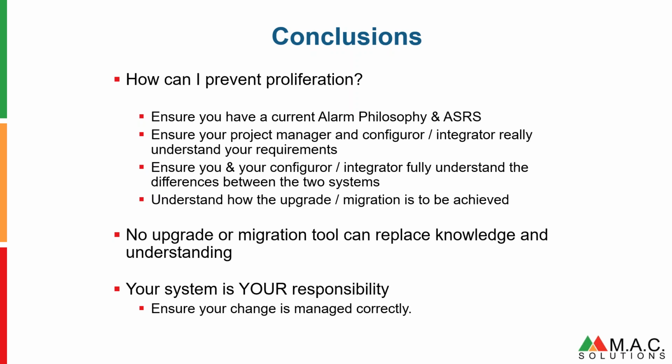And ultimately, the change that's happening, whether it be an upgrade, a new project, a new control system, is your responsibility. You are the one that's going to have to live with this system once the project is closed. You need to make sure that everything's been done correctly. You may not need to micromanage the project, but you need to make sure your project manager is doing all the things your project manager should do, such as not simply closing the project and installing without software acceptance test, like I mentioned earlier. Make sure they're going to do everything.